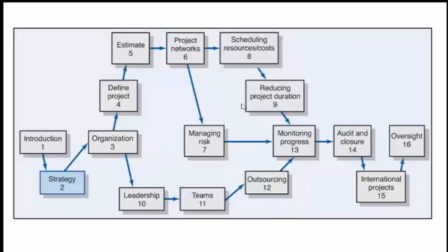For example, there are 10 new project requirements. Then the manager has to have a selection criteria based on which he selects a project. If it is strategically very important, you need to do that. So you have to give weightage on strategy. You need to give weightage on financial criteria, whether it will give you a high value of return, right, and socio-economic impact and things like that. Based on all these parameters, you come up with a weighted scoring, and then from the weighted scoring you try to select the top projects.